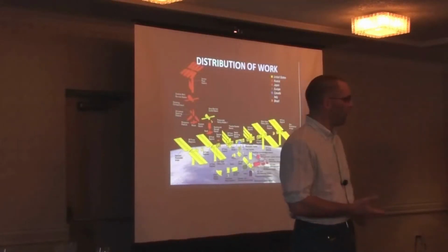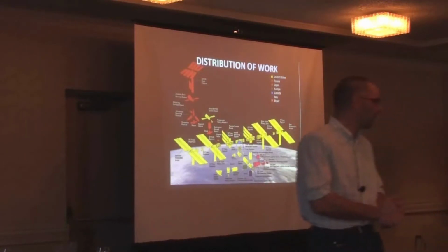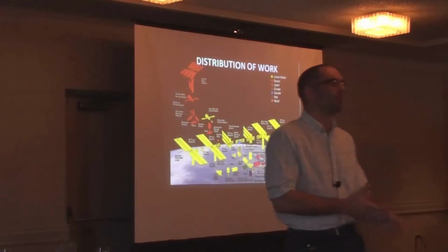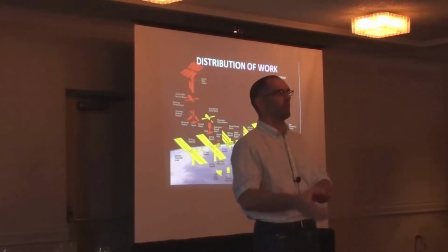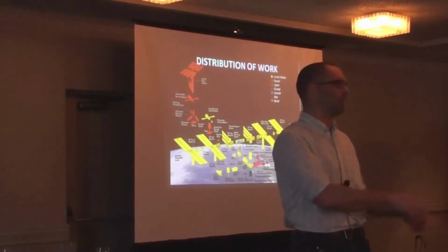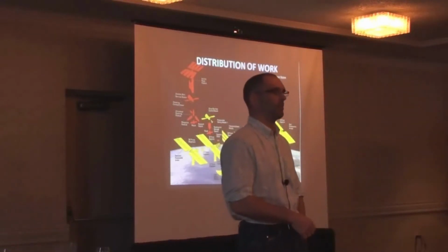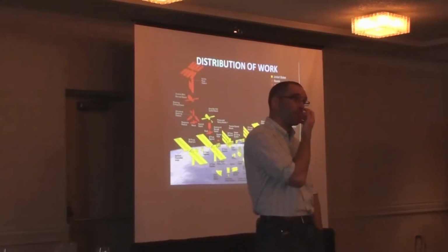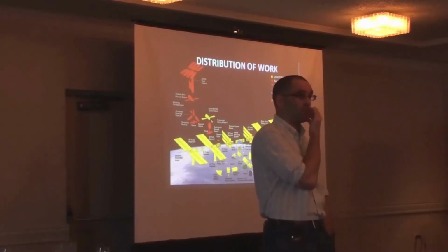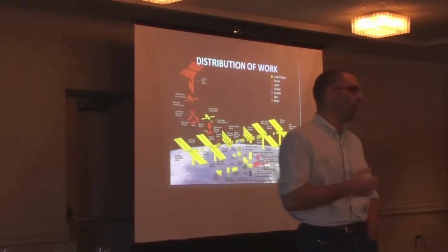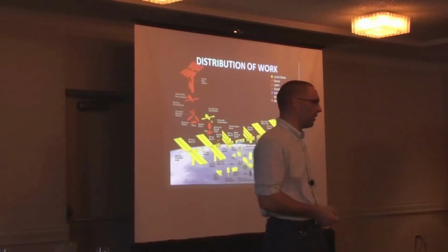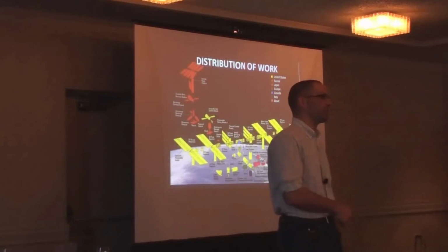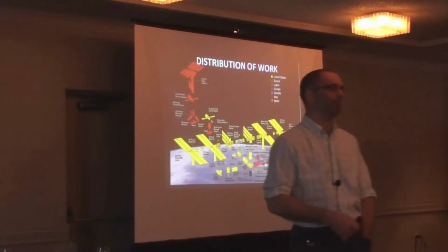And then this goes back to Conway's law. Understand the distribution of your work. Conway's law will tempt you to localize everything, to have teams building components that turn into user stories that get wired together. If any of you have seen Bas Vodde and Craig Larman's book on large-scale Scrum, it has some really interesting stuff about systems thinking and what happens when you do this. Essentially, what we see is that you end up not focusing on the user story, but everyone goes and focuses on the database.